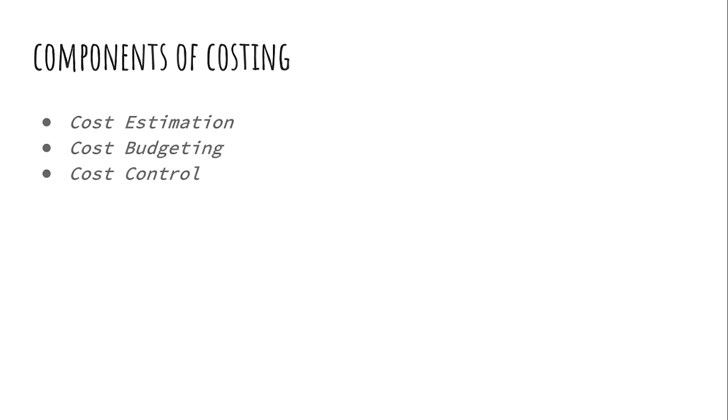So under cost control, what you need is a cost baseline, the project funding requirements, and performance reports. This helps you in doing your cost control. As I said, cost control is you assessing activities or implementation vis-a-vis the budgetary implications. So you need these inputs in doing your cost control: the cost baseline, project funding requirements, work performance information, approved change requests, and the project management plan.